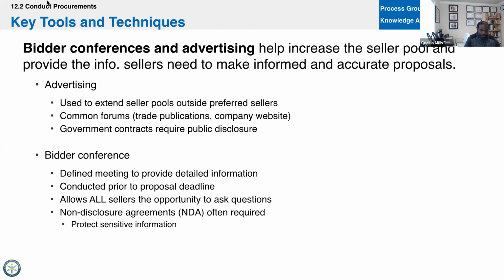So we come in, and it allows all the prospective vendors and contractors to show up and ask me questions about the RFP. I shouldn't say statement of work at this point. They'll ask about the design, the delivery, what they can and can't do. I may not even answer the questions that day. I may take everybody's questions, go back to my team, and strategically answer them because we want to make sure we get the best deal. But then we send the answers out to everyone, regardless of who asked the question. Even if you ask no questions, you will get all of the responses.